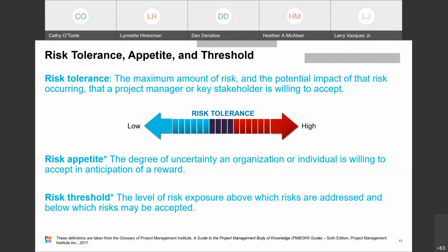Also, in the state of Florida, the customers that we bill that are impacted by this law, maybe we bill about $10,000 worth of taxes a year. Now, if you think about that rate of return, we have to spend $150,000, and we've only got $10,000 a year coming back in, quote, reward. Well, what is our risk appetite in the tax team to do that project?